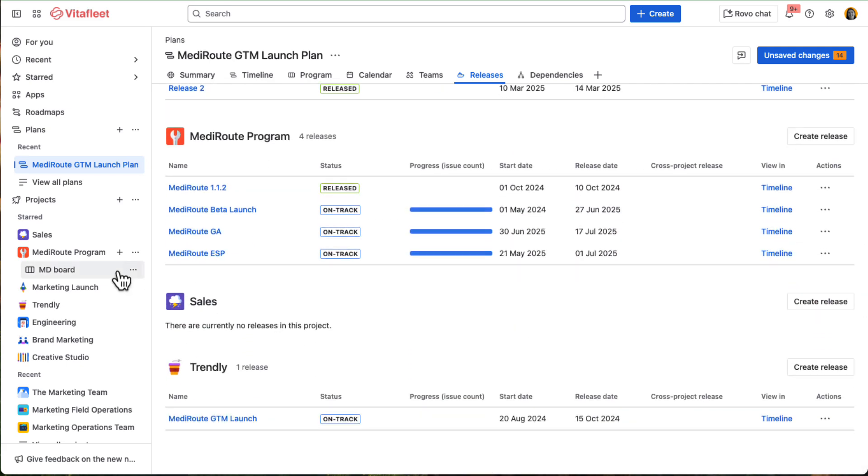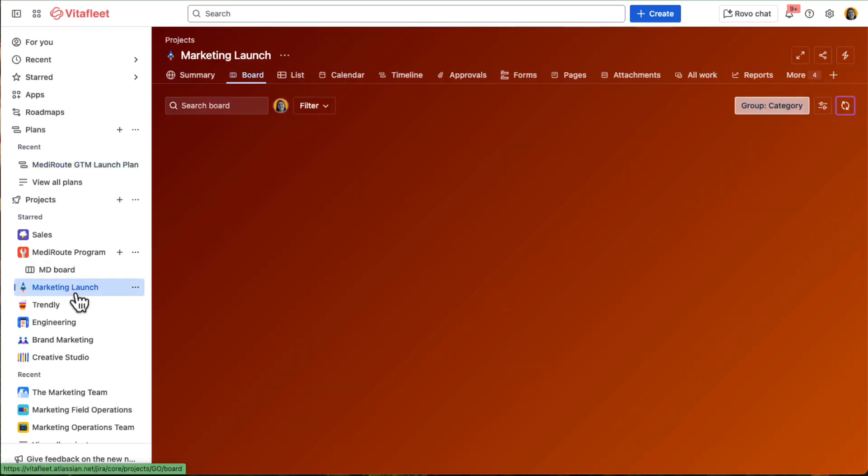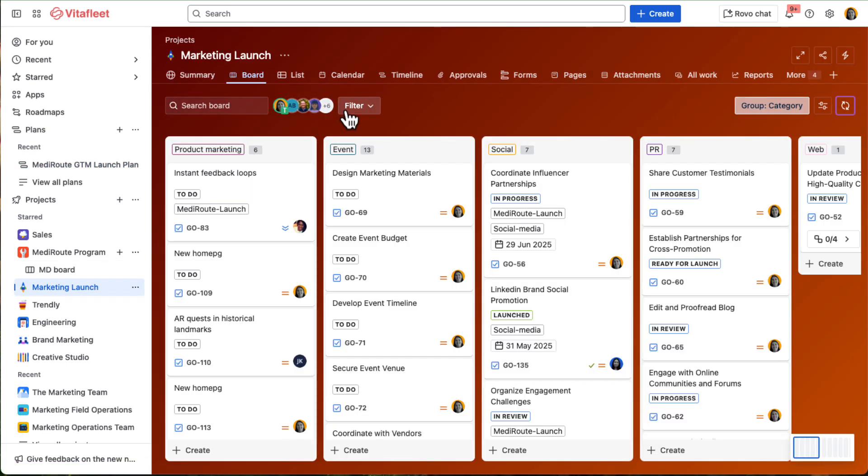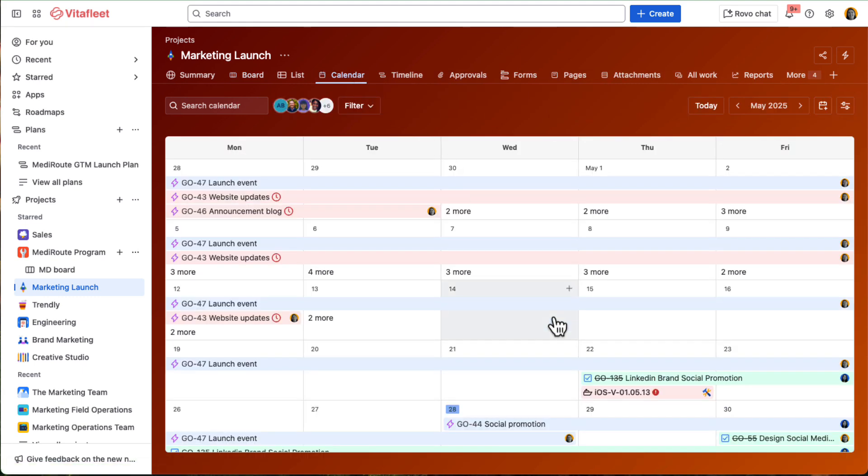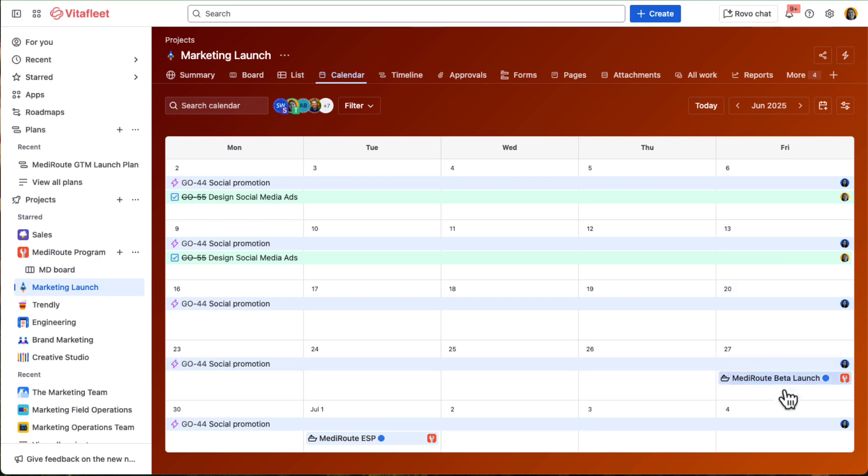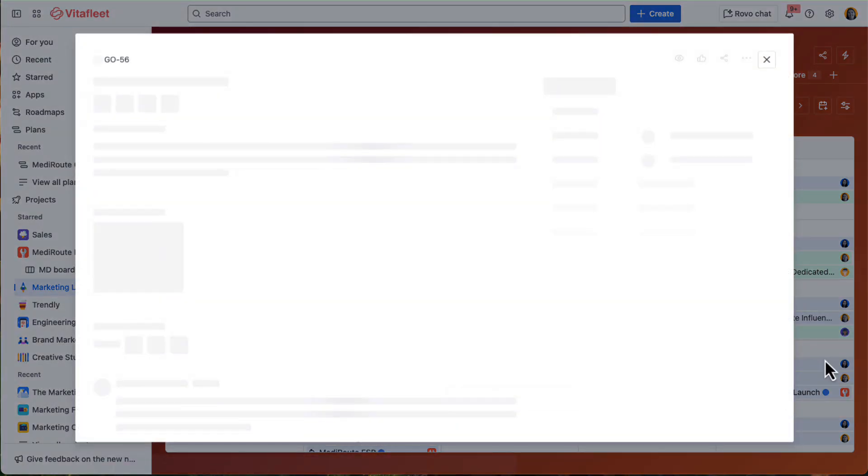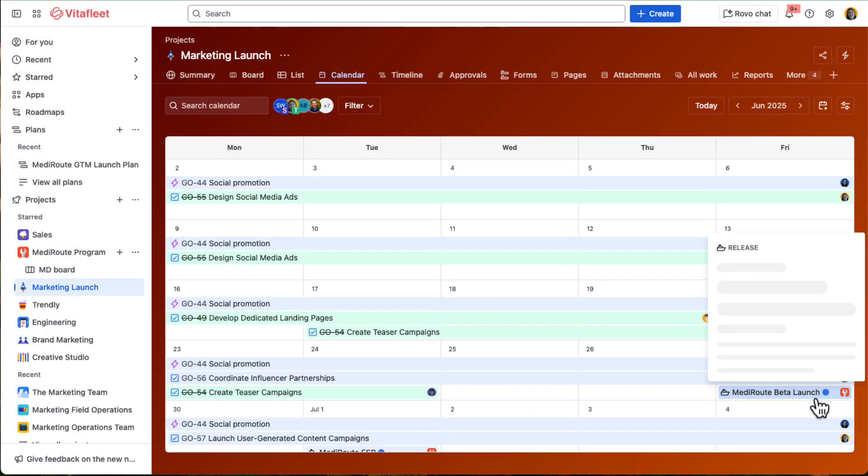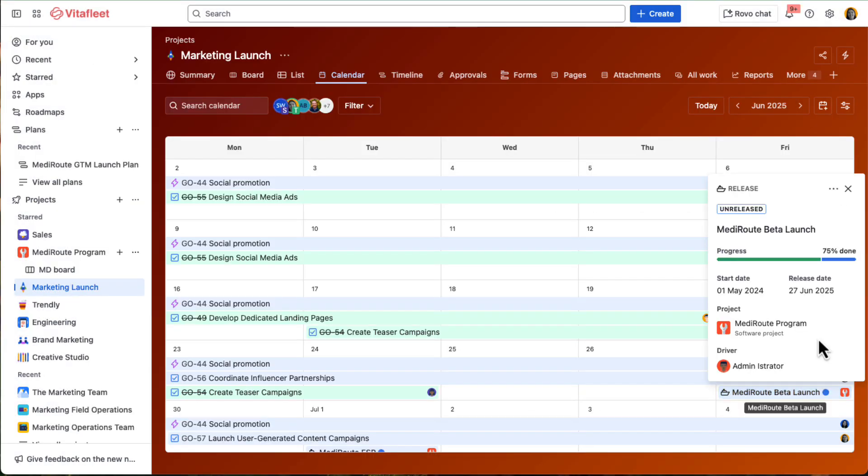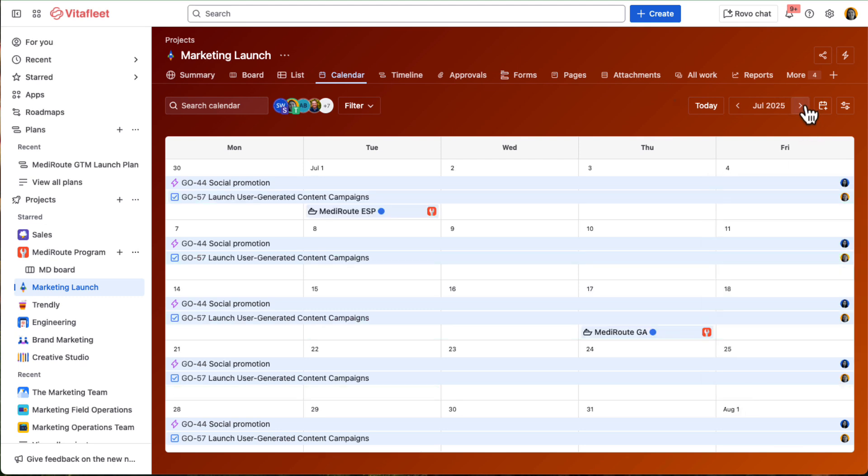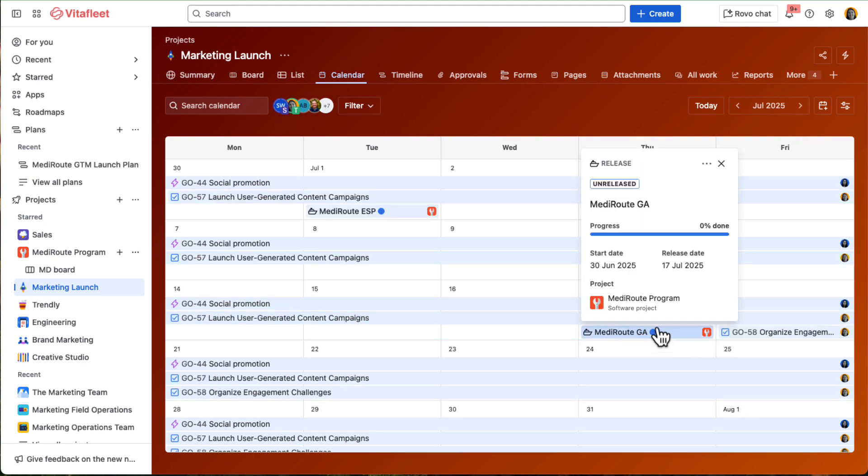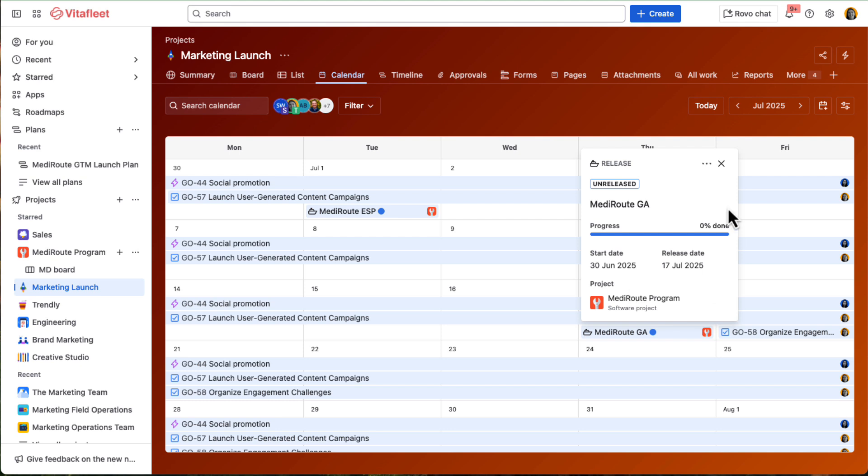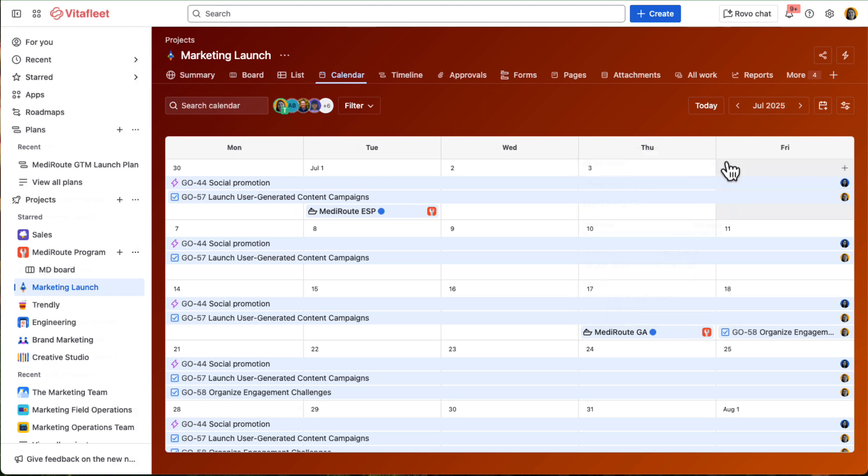She's also pulled key product development milestones, like when MediRoot is going in beta or GA, into the marketing calendar. That way, launch dates are clearly marked alongside campaign efforts. And because dates stay connected across Jira, any changes made by engineering automatically show up in the marketing team's calendar. Tracy doesn't have to chase down updates. She has real-time visibility without the back and forth.